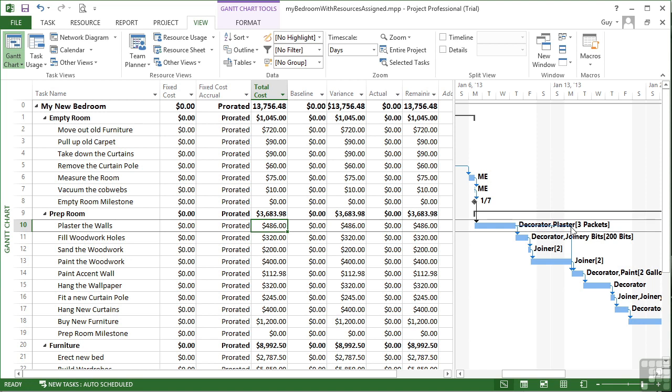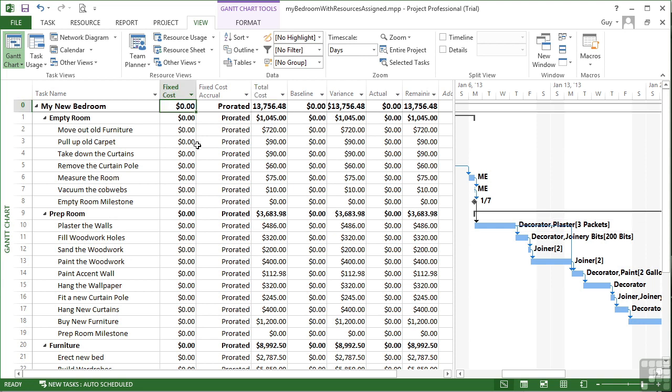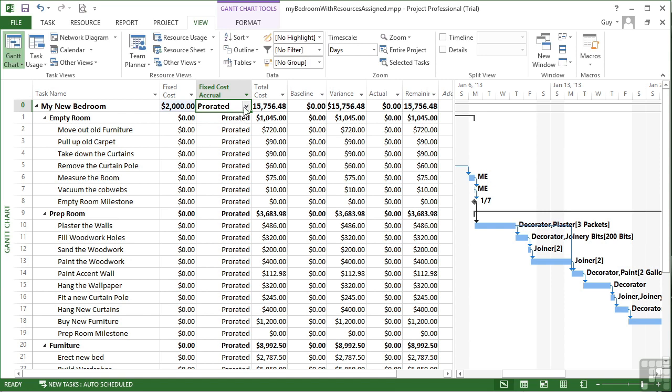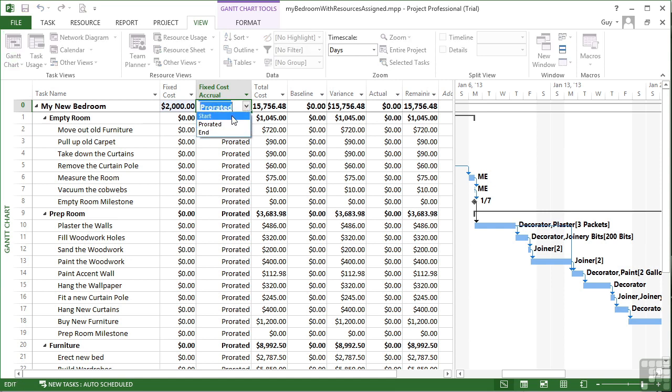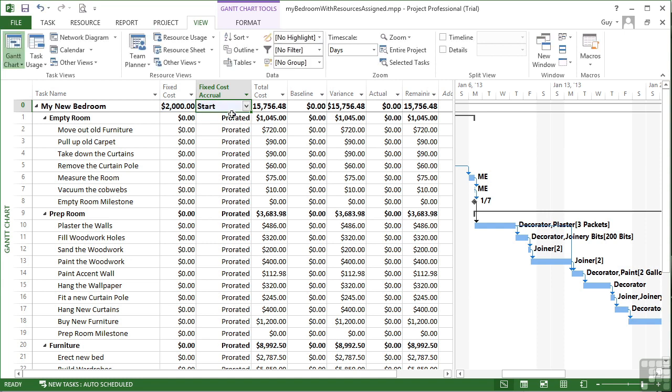But for the moment, we're interested in adding a fixed cost. And now that we have the cost table in view, we can add that fixed cost. So we can add a fixed cost to any of our tasks, even the summary task here right at the top. So I might want to add a fixed cost to this project of $2,000. So I simply add in $2,000. How's that actually calculated? Prorated at the start or at the end. We're going to put it at the start. The only problem now though is we don't actually have anywhere to put where that $2,000 has come from.